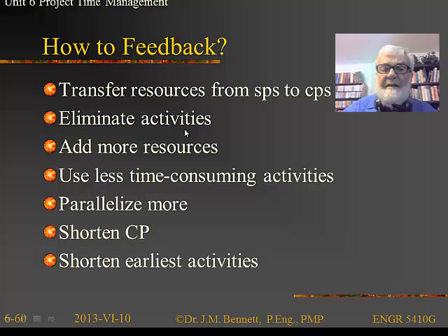Second thing we can do is we can eliminate activities, and we have to be very careful in eliminating activities. One of the knee-jerk reactions of the pointy-haired boss when the schedule starts to get tight is cut out testing. We don't have time for testing. We've got a schedule to meet here. Cold weather, who cares about cold weather? I've got a schedule to keep. Launch the rocket. But the O-rings may fracture. I don't care. I've got a schedule to keep. Launch the rocket. You want to be very careful about eliminating activities so that you don't throw the baby out with the bathwater.